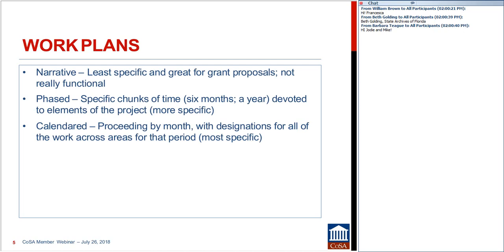By necessity, these are actually the least specific kinds of work plans that we can deliver, because that sentence form doesn't mesh nicely with the line item spreadsheet kind of detail of work that might happen on a day-to-day basis or even a week-to-week basis. But these narrative work plans are really nice for showing the arc of a project and the possible way that the work is going to flow over a year or two or several months.